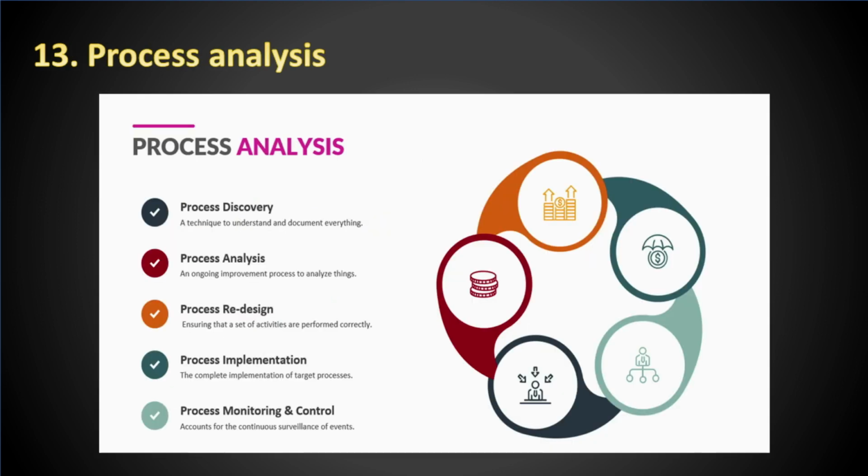Process analysis. Similar to document analysis, process analysis is all about analyzing a quality process to identify scope for improvements, examine existing problems and constraints for smooth running of the process, and identify non-value-adding activities that are draining resources without any benefits. The only process that uses this technique is manage quality.